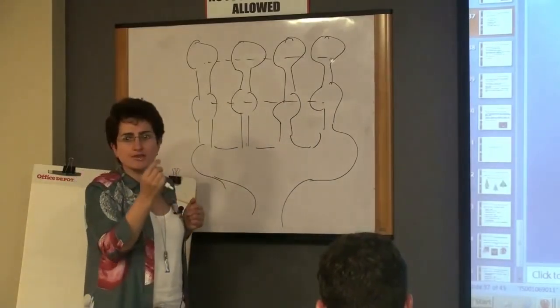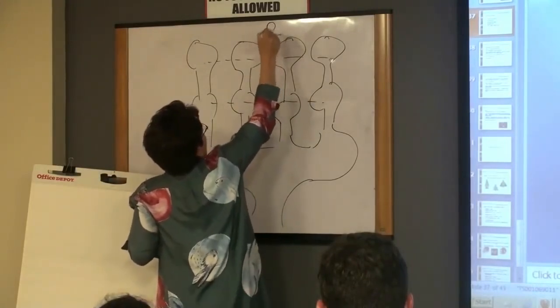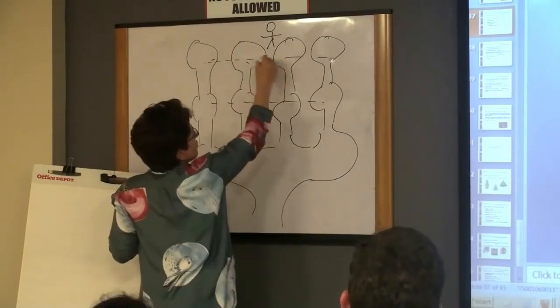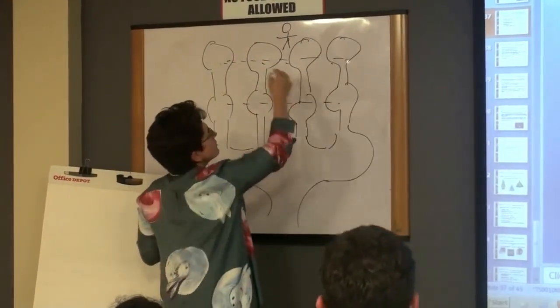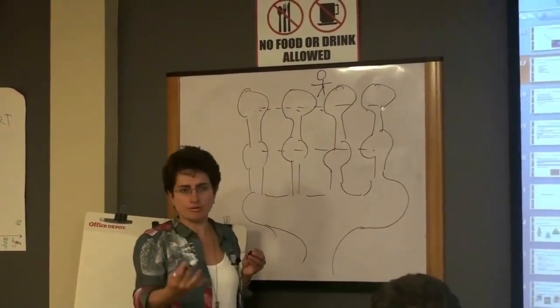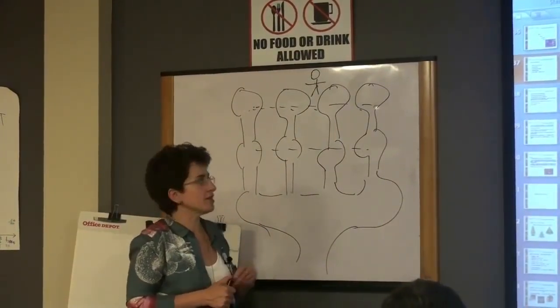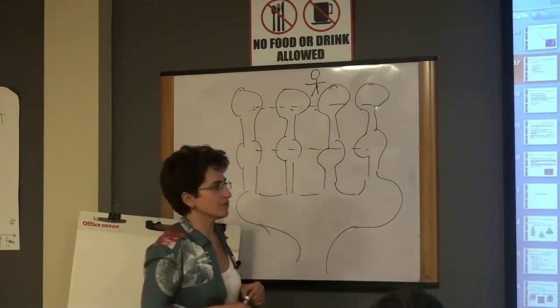There may be one master guy who owns this whole project. He may run across all the teams and coordinate, but more frequently he would have daily meetings with Scrum Masters only, to see how the projects and individual features are doing, and that will make everyone's lives easier, instead of one person chasing like 36 people around, right? This is what we have in this room.